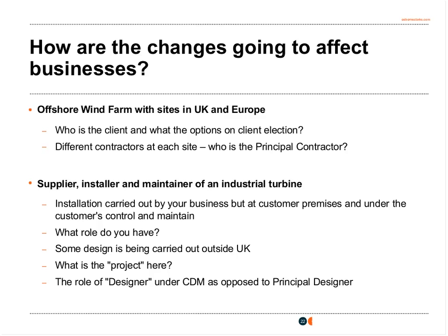If no election is made, then all parties falling within the definition of client will take on these obligations. And election doesn't mean that the other parties who could be a client have no obligations under CDM 2015. They will still have the obligation to provide information for the pre-construction information and cooperate with others on the project.